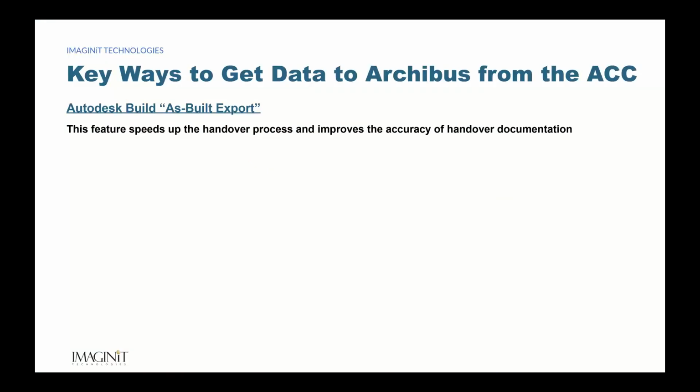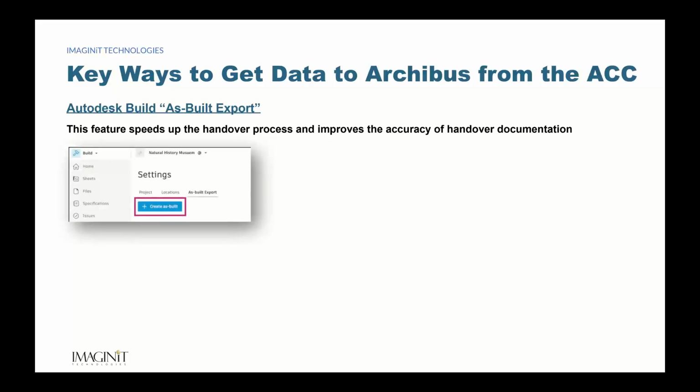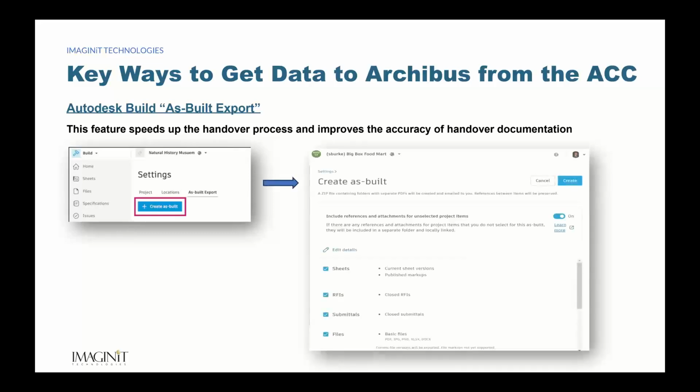So right here, one of the key ways to get data from the Construction Cloud here is the as-built import. That's the first stage here. And this is going to allow me to take all of my data, and I'll show this in the product a little bit here, of how to get all that data out into a format, just sometimes it's just PDFs, warranty data, sheets, RFI reports, submittals. These are all things that you want at the end of a project that are traditionally handed over to the client, right? If you're an owner, one of the key things here is that you can mandate that, your construction firms, if you choose to do this, are going to use this tool. You'll host it. They'll work within your environment, and you own the data. It's always there, right?